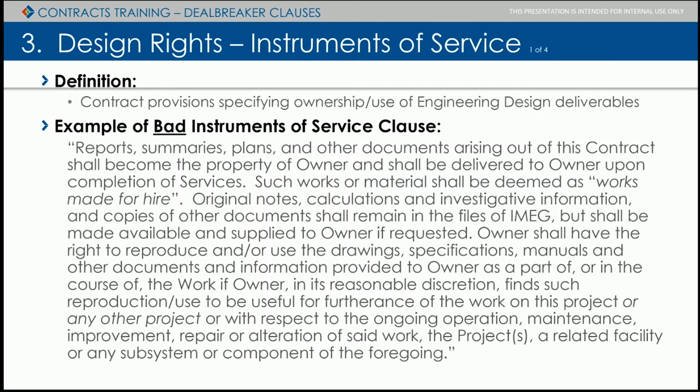So to the extent that we haven't been paid or there's a dispute on a portion of our work, how we usually are able to work those out in a way that's beneficial to IMEG is to indicate, looks like you have an issue with some of the work. So we're either going to figure it out or we're going to hold up our deliverable. And that usually gets the problem solved pretty quickly. Sometimes that's not practical. I totally understand it, but it's something I want to point out up front with instruments of service.